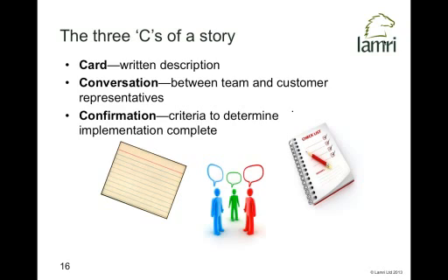And primarily, the conversation bit. It's a placeholder for what will become a series of conversations between the appropriate users and the developers who are going to develop that, and the testers who are potentially going to write the tests for it and implement the tests. The first initial conversations occur when the story is identified at a high level early in the project, and then further conversations and questions come when we're actually estimating the story, saying, okay, how big is it? How long is it going to take us to do this?